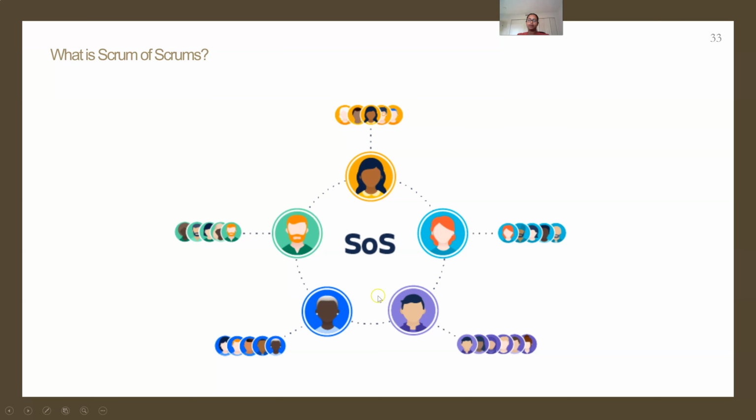So a few different things which can be done during Scrum of Scrums are keeping the meeting to just 15 minutes, establishing a working agreement, then establishing a collective routine or agenda. Finally, it's always better to track and visualize the days until the demo meeting. Usually the demo meetings would be in sprint retrospective or product release retrospective meetings.